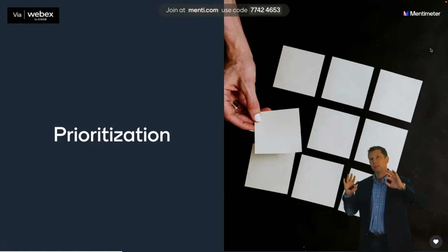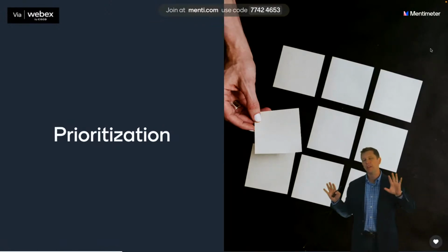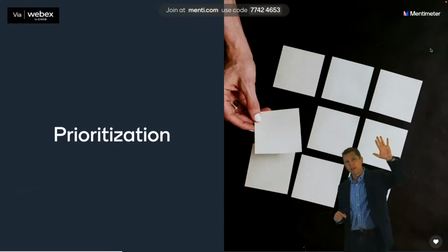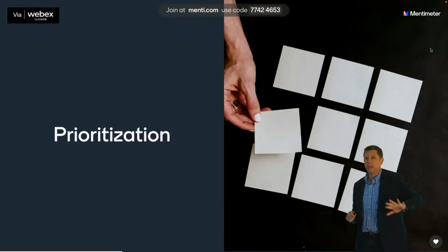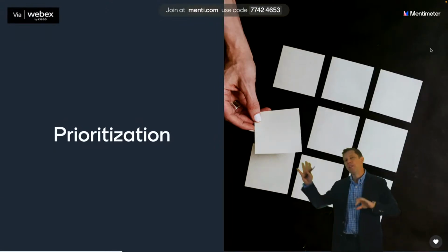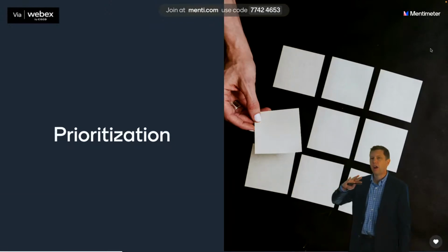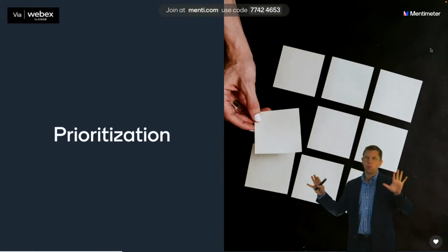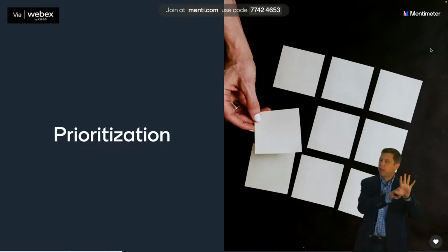the individual that was helping run things here did a great job. And he said, okay, we're going to have one bucket here that is MVP. Nothing goes in here unless we have to have it in order to process a bill. Then we've got another bucket here that is non-MVP. And people were really struggling because they really wanted their things to be classified as MVP.